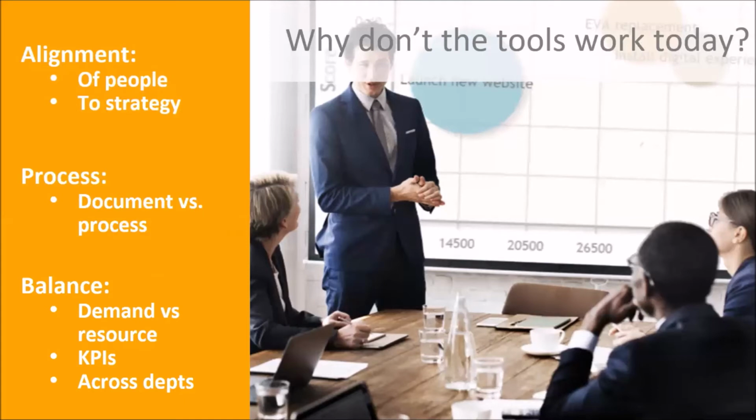And you also need to think about balancing the activity across departments in the organization. There's absolutely no point putting together a portfolio of projects where all of the projects have an impact on your customer service team in August, because those people will collapse, right? They just can't absorb all that change. And by the way, at the same time, even though your customer service people are collapsing because so many projects are hitting them, you might have another team, the finance team, for example, that's sitting there twiddling their thumbs with no projects coming, just chugging away with their work.